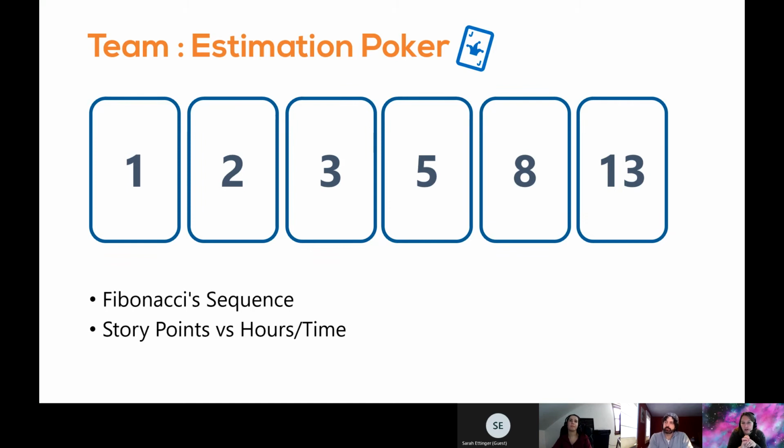Sometimes these are hours. You're not looking to get every single hour. This could be weeks. You again determine what your measurement is. Are you using effort, which are time units, or are you using duration? So it's always important to focus on duration versus effort. Which one are you estimating? The other piece is you basically say, okay, here's what I'm trying to do. I want to add this new change order process.